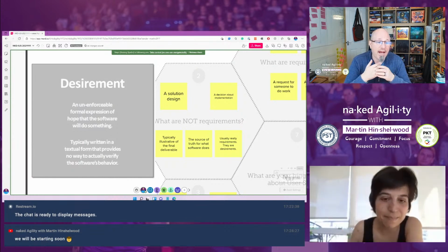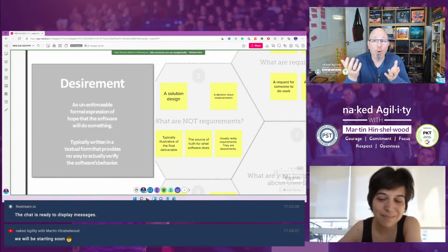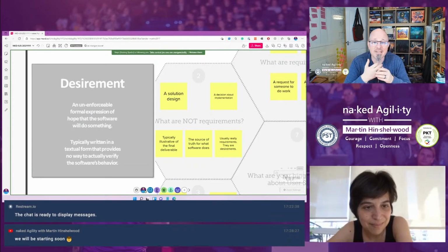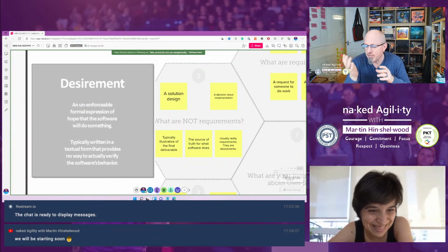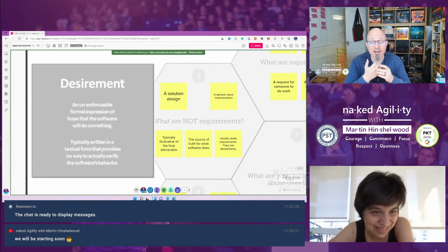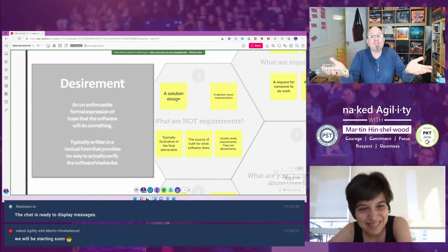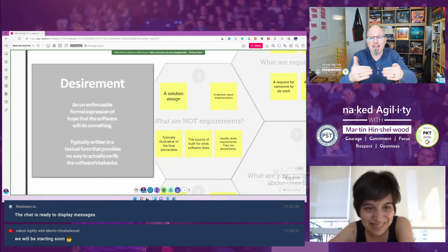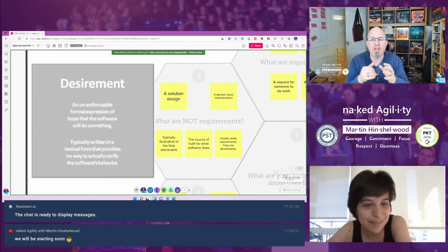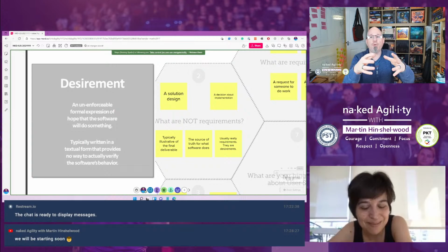And doing that planning poker exercise, where one team member says, "Oh, that's a 2, that's super easy," and another team member says, "That's a 21, that's super hard." Well, okay, somebody knows something that somebody else doesn't. Let's have some conversations around how do we create a cohesive understanding across the team.